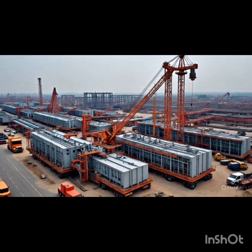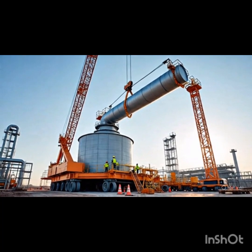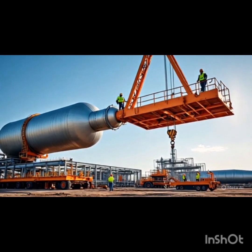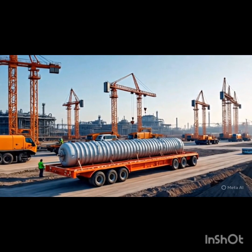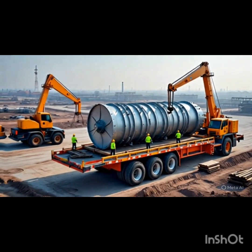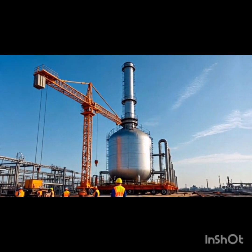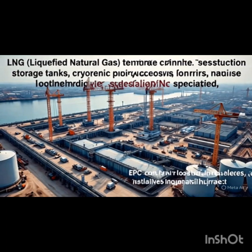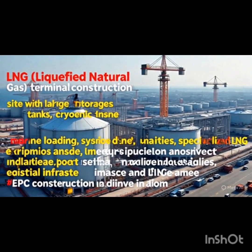And this phase also includes building complex 3D models. Those are vital later on to make sure pipes don't clash with steel beams, for instance. Okay, makes sense. Then comes P, procurement. This sounds like more than just ordering parts. Oh, it's a beast. Procurement is basically a huge parallel project running alongside engineering. Right. You're sourcing highly specialized equipment from all over the world. Think vendor selection, quality checks, incredibly complex logistics, dealing with customs, currency fluctuations, often over several years. Honestly, how well procurement runs can make or break the entire project timeline, especially because it overlaps so much with the design work.